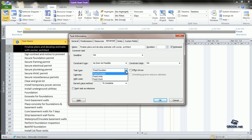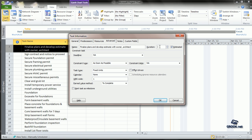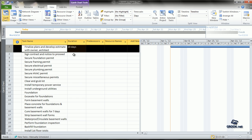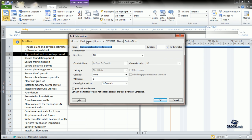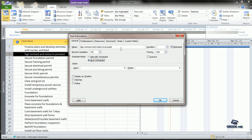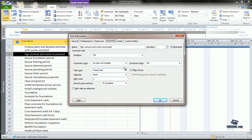You can have fixed units, fixed work, or fixed duration. If one parameter is fixed and you change the second parameter, the third parameter automatically gets calculated. For example, we take fixed units and can enter the duration and say OK. Similarly, for the next one, you can make it auto-scheduled, go to the advanced tab, leave it as fixed units, and give in the duration.